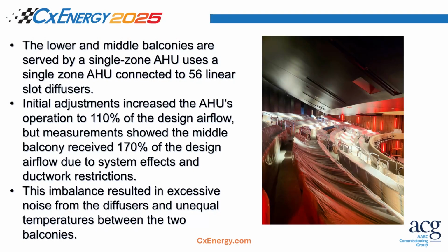Because as I said, once they put that ceiling tile, or once they take that scaffolding out, there was no way to get back to balance it. And then obviously another portion of that auditorium was the two balconies. That was another area where, just because of the system effect, the way the ductwork was, the lower balcony was again about 40% of design, and then the top balcony was 170% of design. And the problem was I think it was about a 10-foot ceiling between the lower balcony, and then obviously on the top balcony it was literally 6 foot. You can reach up and just touch the grills.